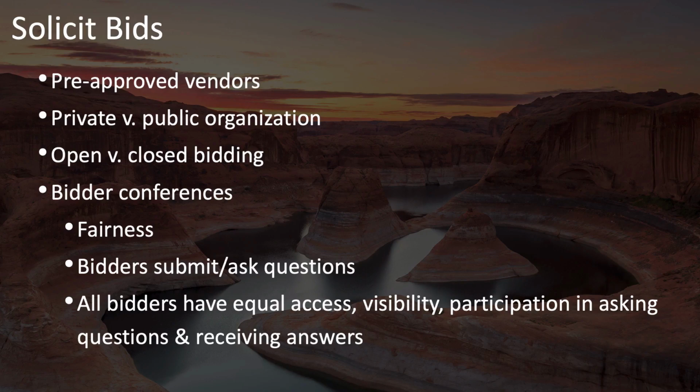When it comes to bidder conferences, the key is fairness. You need to make sure that in this process in which bidders can submit and ask questions and get answers from you, that all bidders have equal access and visibility, and that they have equal participation when it comes to asking these questions and getting these answers. A bidders conference can be handled just as any other meeting in the sense that you could have everyone all gather together into one room, or you could have some people that are remote and you have some remote communications technology in place to involve them real time.